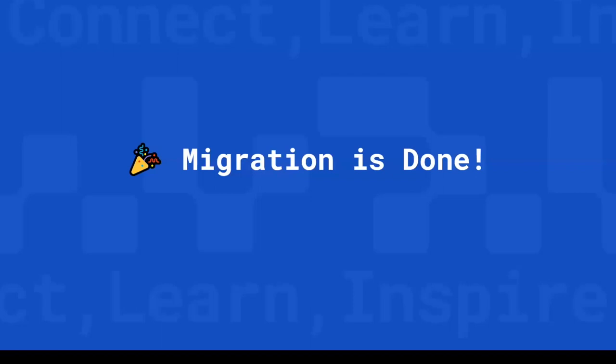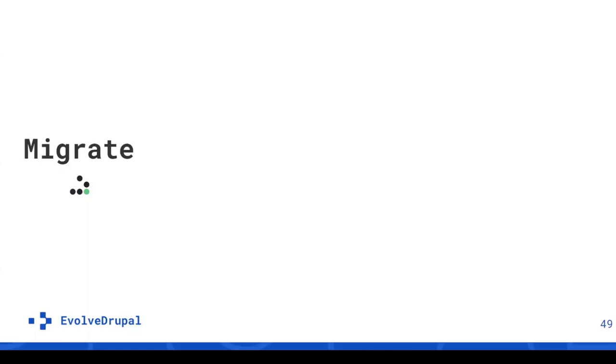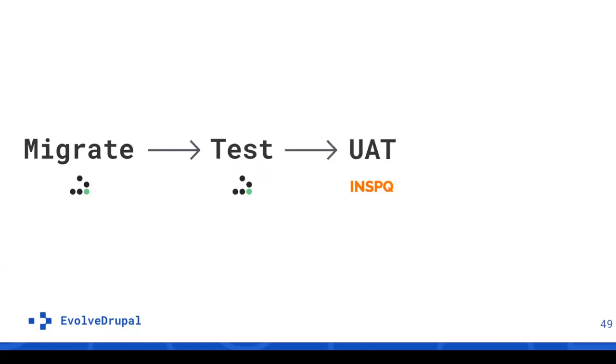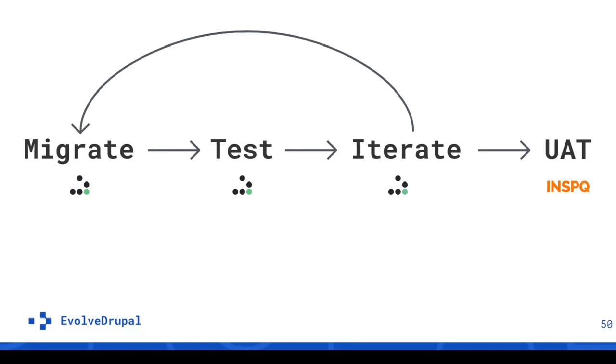After the migration is finished, it's actually not quite done yet. We've ported everything over, the content's in a new spot. What are the next steps? We've run the migration, we're next going to do some testing making sure it's all come over correctly. Then there's time for UAT like Olya mentioned earlier. And that's kind of it - we do that testing, everything's good, time for launch. Well, in reality, usually there's more of an iterate phase where we'll do some tweaks, fix challenges we come across. Then we can say we're ready to go, validate those changes, and the migration's ready.